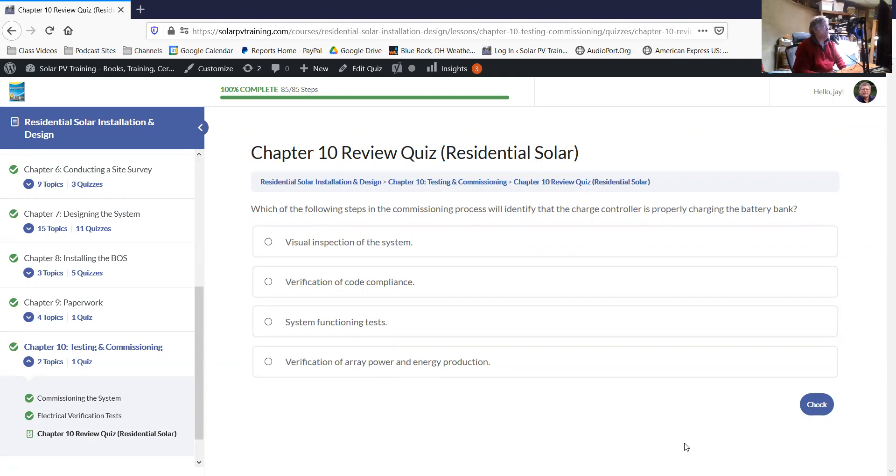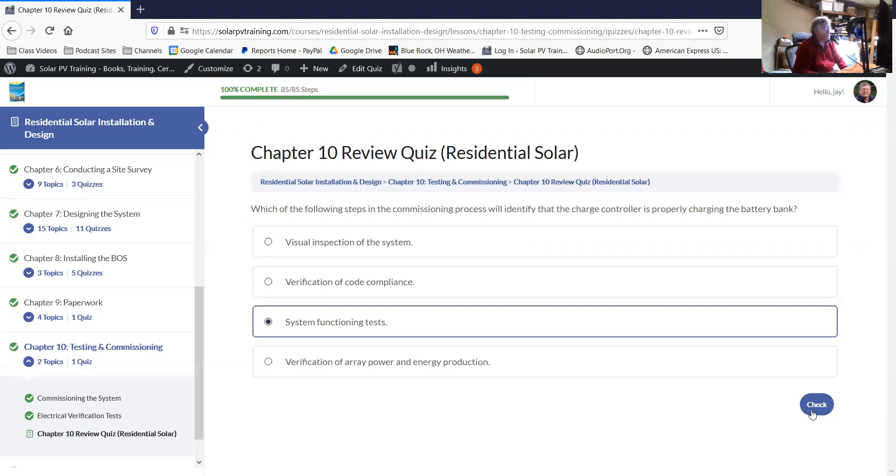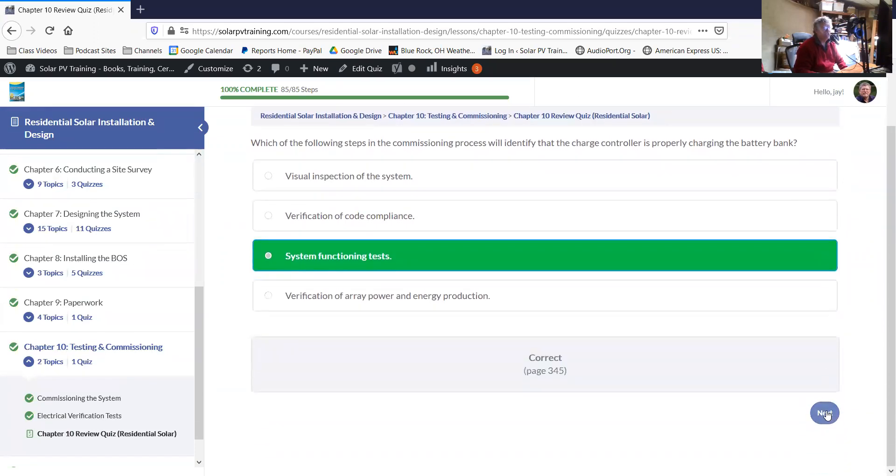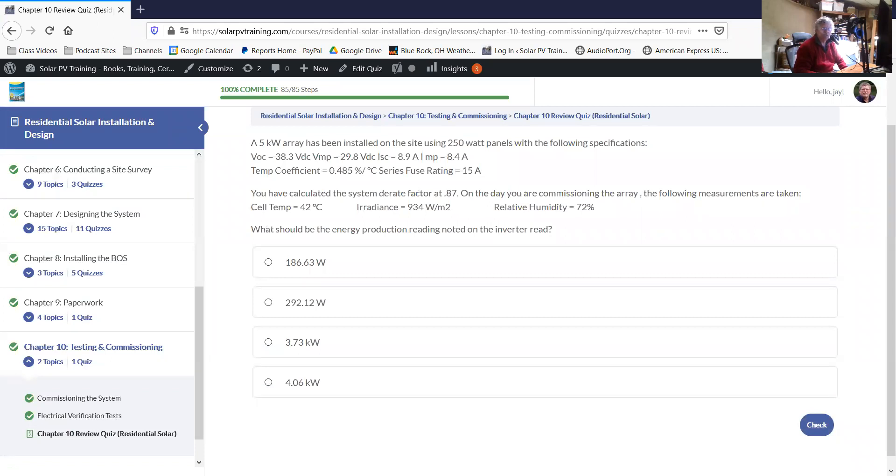Which of the following steps in the commissioning process will identify that the charge controller is not working? This would be a system function test. You want to just double check, make sure all of your systems are functioning. Usually the product specifications will tell you how to go through that. Then you can double check to see if the system as installed is performing as you would expect it to perform.